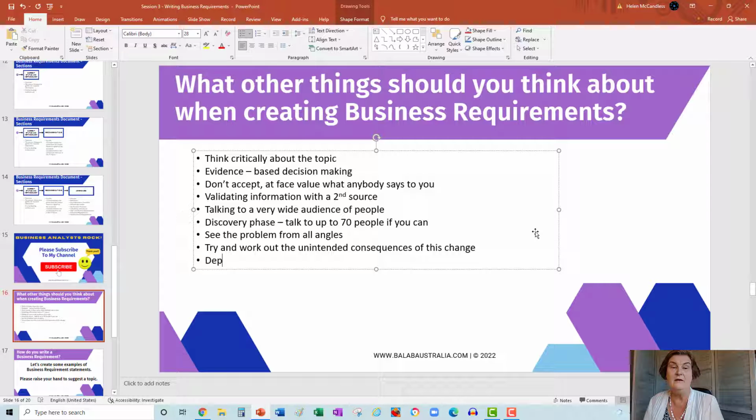And the other thing to look at is dependencies. By dependencies, I mean projects that are upstream of you, which are effectively ahead of you. Are they creating a capability that your project needs so it can deliver successfully? And conversely, downstream, projects that are after yours, are they depending or waiting for you to develop something so they can be successful? The importance of this is if your project decides to cut a certain capability because of time or resources,